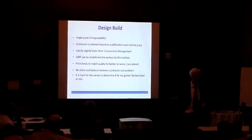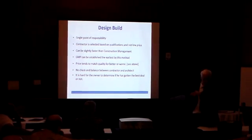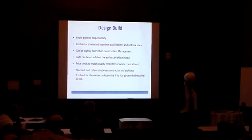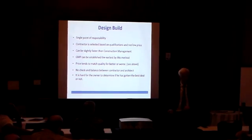You being familiar, I'll pick on you a minute. Is what I've been describing kind of? Yeah, it's exactly. Sometimes you can establish the GMP when they come back with their proposals. They usually know from the square footage, what you put into the RFP. We have a pretty extensive RFP for our rectories. We know what the bishop wants to see in rectories. And then we wait until after the design and the pastor, because we want the pastor to rule the finishes. So we do have a lot of say in design.